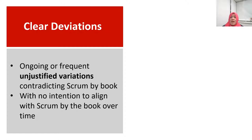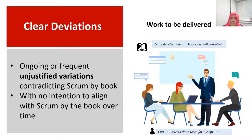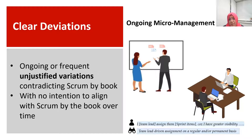Last, we have clear deviations. These are ongoing or frequent unjustified variations contradicting Scrum by the Book, with no intention to align with it over time. The Primer states the team decides how much work it will complete. In practice, we found the product owner deciding how much and what work the team will deliver during the sprint. Online micromanagement is neither supported by the Primer or Guide, but we found multiple instances of team lead-driven assignment on a regular basis as clear deviations.